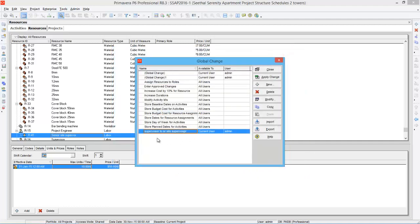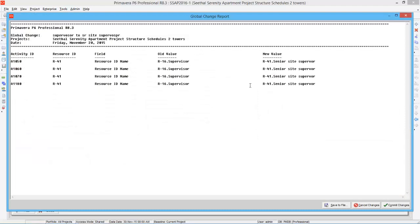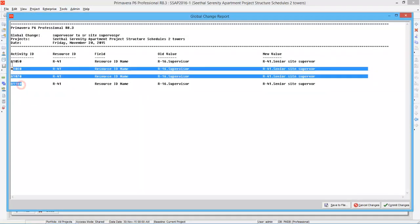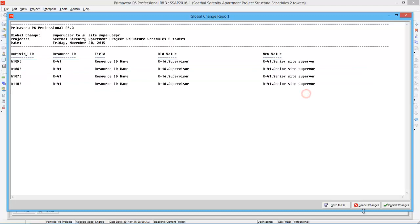So here you have created a new global change supervisor to senior site supervisor. After that press apply change. So here you can see this is a report. It says there are four activities where supervisor is assigned. Now the new value is senior site supervisor. Say commit changes.